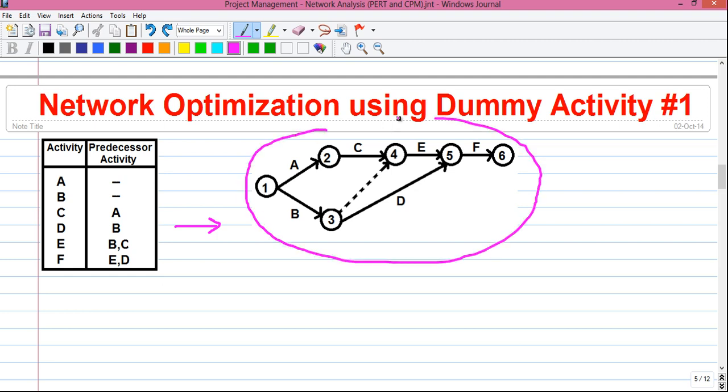First, do not look at this network. I will tell you how to draw it. So starting from the first activity that is activity A and next activity B. Both the activity A and B don't have any predecessor activity. That means they belong to the starting event or you can say they are the starting activities.